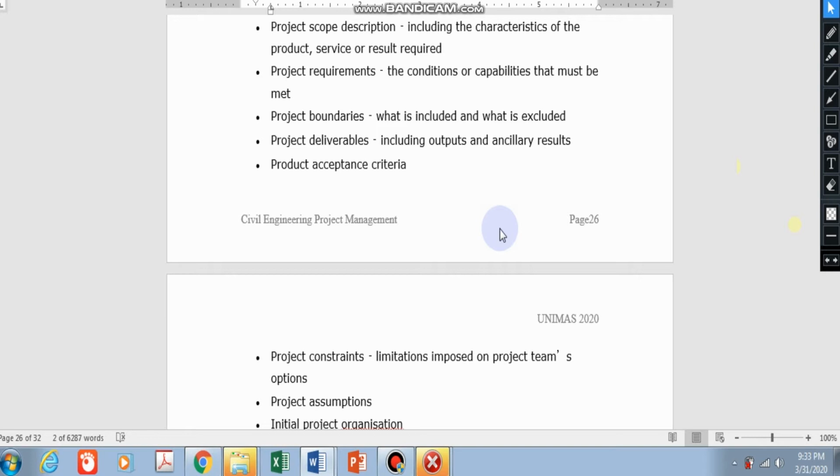If you do it at this point in time, you definitely can, because at this point, in the preliminary study, you do have some dimensions already, and you can change some dimensions. All the major parts of things are here already. So if you do your value engineering towards the end of the final design, some people may not like it because they feel they've put in so much detail.